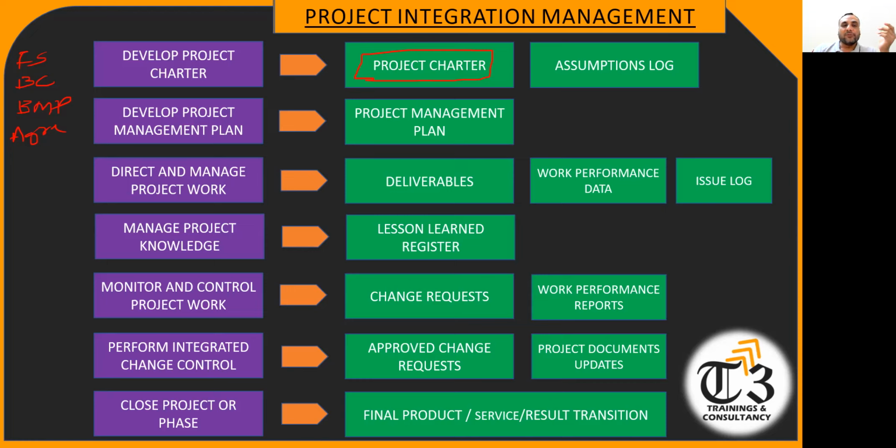When the project manager becomes the project manager with the help of the charter, from the first day he starts his assumption log. So before starting the work, these assumptions can be verified as to whether they are still valid or not. After becoming the project manager by the project charter, the first task of the project manager is to identify stakeholders and make a document called the stakeholder register, which contains their names, their contact information, their requirements, their expectations. Other things also include influence categories and so on.